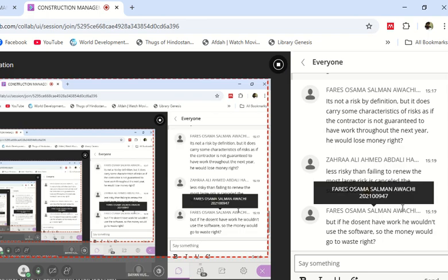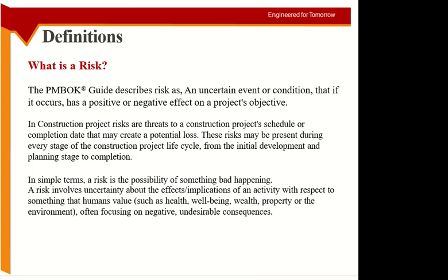Falling of the rain is uncertain. Equipment breaking down is uncertain. But finishing the fuel of the equipment is not uncertain. I know this much is the mileage of the equipment, and after this much mileage I need to refill. So this is not uncertain. This is the element I was emphasizing, and this is why I give this example.